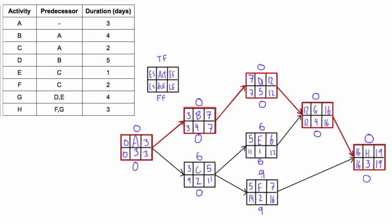Activity F has both a total float and a free float of 9, so the same kind of reasoning applies there. But activity C has a total float of 6, meaning you could delay it by up to 6 days without increasing the project duration. However, if you delayed C by even one day, you would affect the earliest start of at least one of its successors. For example, if you started C on day 4, you'd finish on day 6, meaning its successors couldn't start on day 5 — they'd have to start on day 6. That's why activity C has a free float of 0.